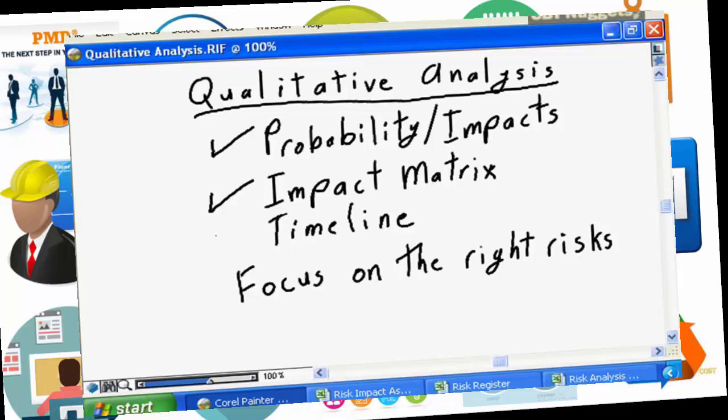It's critical that we put the risks on a timeline. As a project manager, you have more things to do in a day than you have hours in the day to do, so it's important that you prioritize and understand which risks are likely to happen in the near future and warrant your attention, and which risks are likely to happen further out in your project timeline, and simply put those on a to-do, brought forward list to be dealt with when they become true active risks for your project.